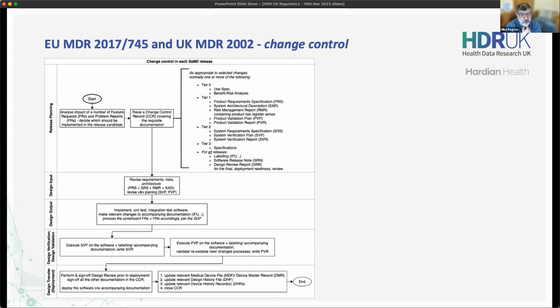Like you realize through monitoring your virtual server, you're running out of virtual disk space, you need to upgrade it, or you need to specify another core or something. I don't know, silly things like that. Or on the user interface, typos, spelling mistakes that have got through, not really affecting the requirements so much. So you could do that, and we'd probably call that a version 1.0.1 change, a patch change, or a security patch to a component that doesn't really change the behavior otherwise.